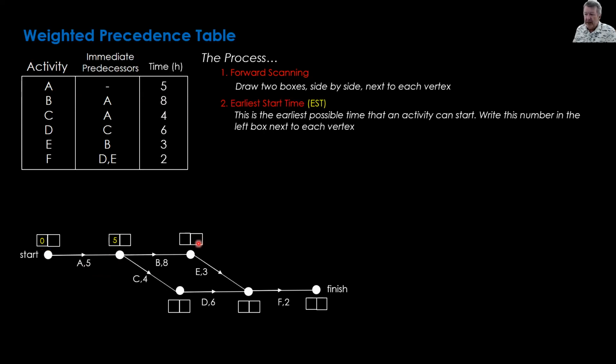Let's work our way along here. 5, we're going to go down, add the 8, and the answer will be 13. We added in there. All right, that's where we go next. We'll go down the way. 5 plus 4 is 9, which will come down into the box here. Now, you'll notice we have a junction down here.